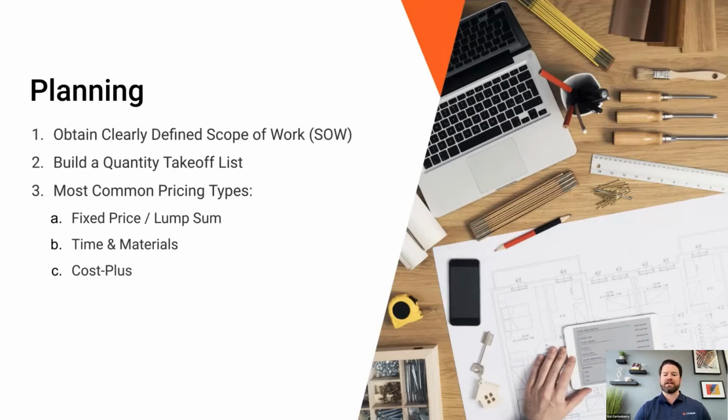It also takes making sure that you're doing the takeoff, taking all of the quantities and the measurements. Again, figuring out exactly what it's going to cost to run that job is one of the most important things you can do when you're generating the price for the job. Because without that, if you don't know what a job's going to cost you, then at the end of the day, regardless of which pricing mechanism you use, you're not going to come close, because you could easily overlook costs that you should have had incorporated into that.